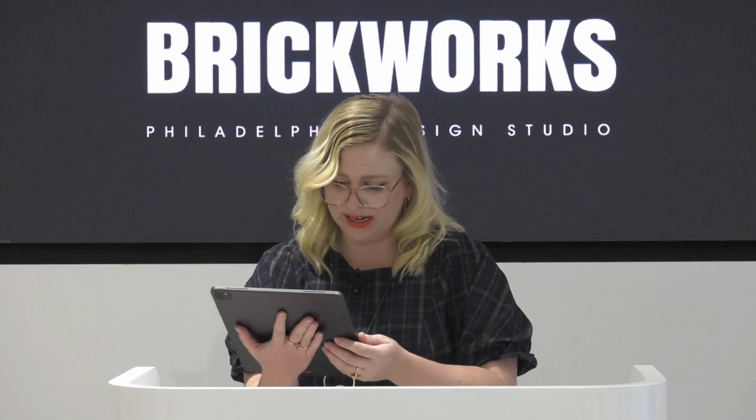Okay, Roland's asking what is the lead time. So we allow an 8-week lead time for manufacture and shipping to make sure that we've got the time to manufacture the tile for you and ship them here to the United States. If we have them in stock, they can be picked up from our Mid-Atlantic value-added plant as well.